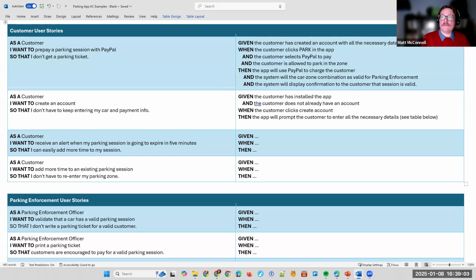It's also good to call out, okay, this piece is a separate story. This is out of scope. So separate stories will handle data validation and storing customer info to the database. So this is just about giving the customer the opportunity to enter the information.